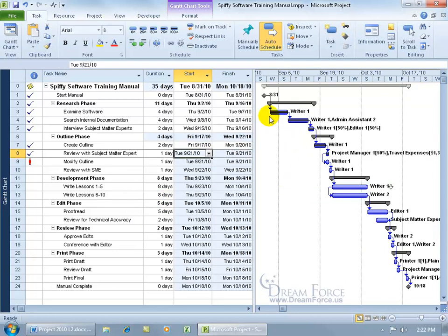You can see that all these that have the black progress bar get bumped out one at a time until I get to a point where I change the one that has been completed, and the successors that haven't been marked complete will automatically fall in place. Because when you're dealing with actuals here and you update them, it just moves that task and it doesn't affect the other ones if its successor has been completed as well. But if, again, the successors have not been completed, then you see when I adjusted this one and pushed it out, everything else, like a domino effect, gets pushed out.